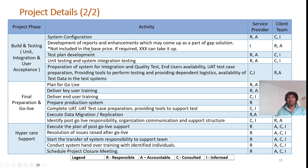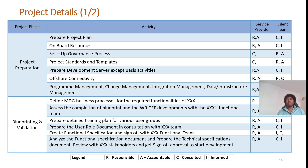In the blueprinting phase you define MDG business processes, define the scope of objects, prepare a detailed training plan for user groups, and prepare user role documents in consultation with the customer team. In the build phase you do baseline configurations, develop in the system, plan test plans, create UAT test cases and test groups. In the final preparation phase you plan the go-live, deliver user training, prepare the production system, obtain UAT business sign-off, perform data migration and replication, prepare cutover activities, set the objects in the production system, and provide go-live support for two to three weeks.